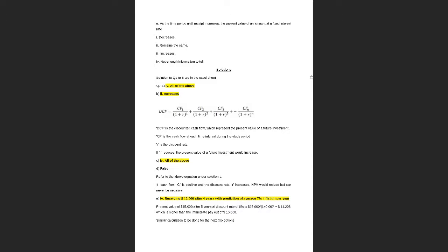So I asked Sauradeep that this is considered a top priority issue, especially considering the holiday period. The students were wondering if this would still be considered a top priority situation if it did not fall in the holiday season, given that it will cause a delay of only 2 weeks. That was my question. And his response is that in this particular context, this becomes a top priority due to the holiday period. Else, there is sufficient time to address the change and submit.